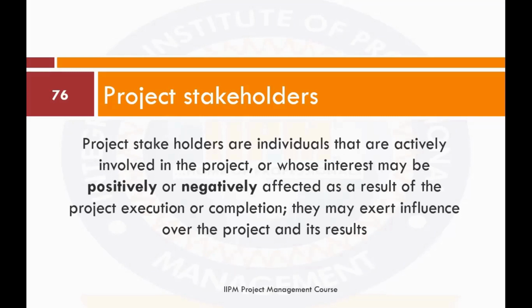I remember sleeping on that couch from the time we came till the next day. And when we discovered that that project was not going to be feasible, we left. I did not go back to that place. I don't know if any other member of the team went back. The major stakeholders here, the villagers, who were even supposed to be the primary beneficiaries, the king would have considered the king as the most important factor. But the villagers themselves said, no, king, we don't want it.